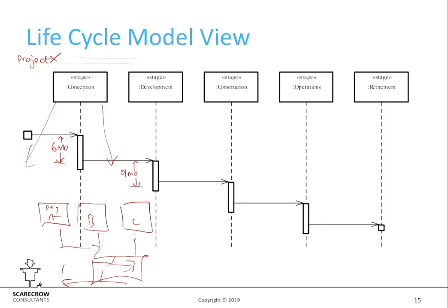And then similarly, because process execution groups are made of processes, each of those groups we would break down into another level where the lifelines would be the actual processes within them. And again, we can put timings on. These are processes, and processes are made up of activities. You could either break it down another level or put the activities on the lifelines. So you can put your timings down at this low level, how long you're going to spend in each process.